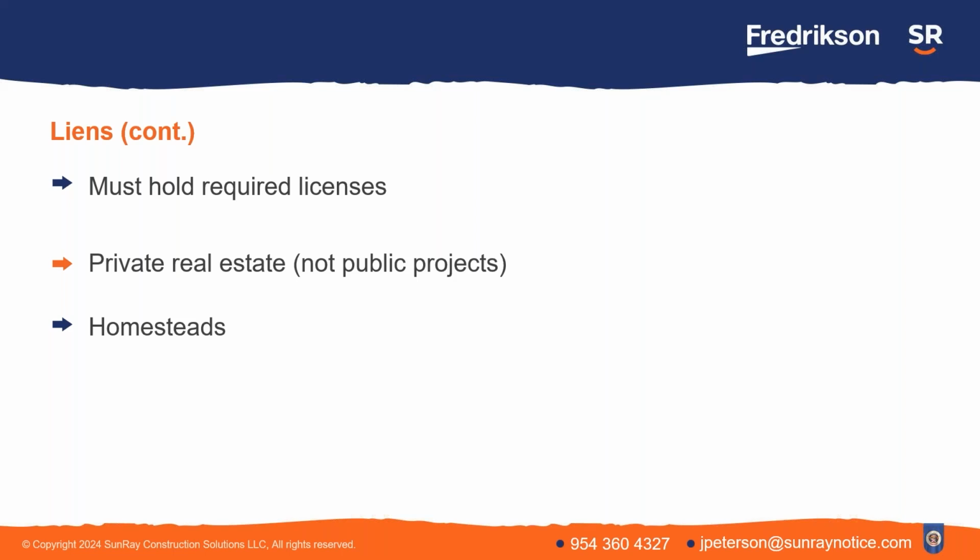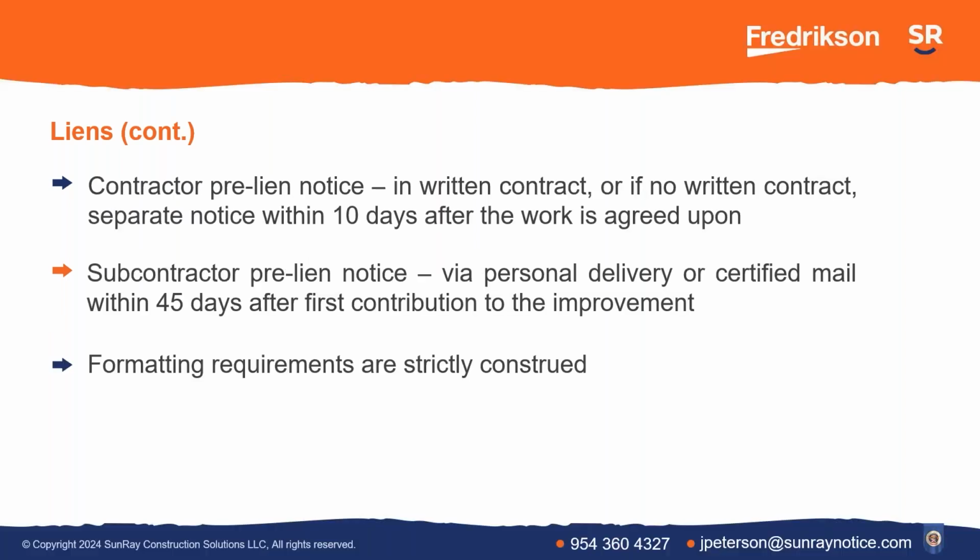Also, a lot of people say, or say they heard somebody say, that you can't have liens on homesteads. That's not accurate in Minnesota. There is a homestead exemption in Minnesota where under certain circumstances you cannot collect a debt against someone's homestead. That does not apply to mechanics liens. So if you work on a residential building project in Minnesota, you absolutely can assert a mechanics lien right, even though people talk about this homestead exemption. It does not apply here.